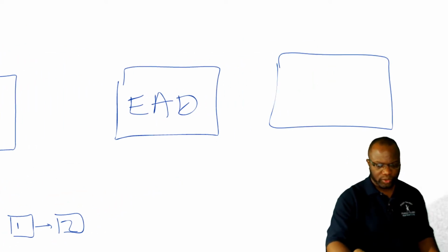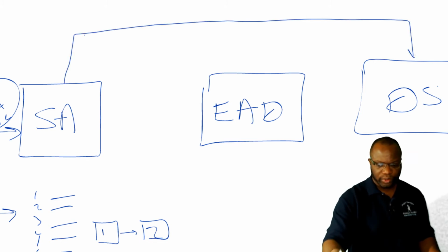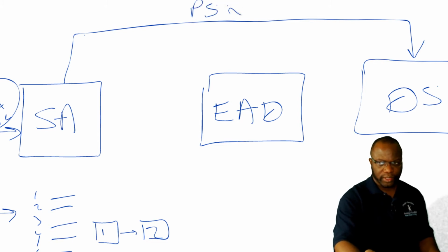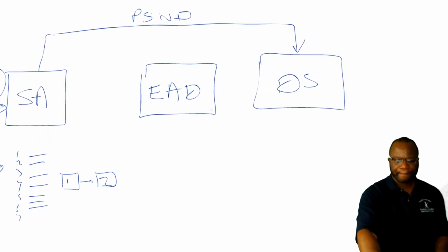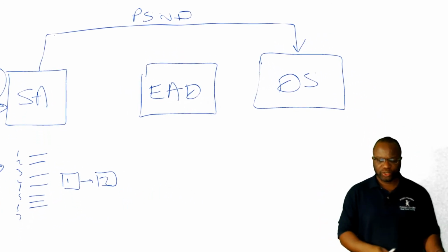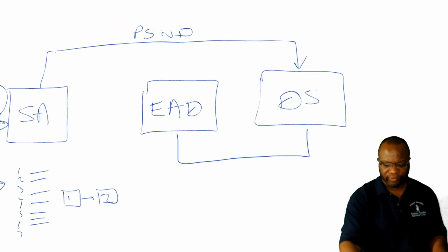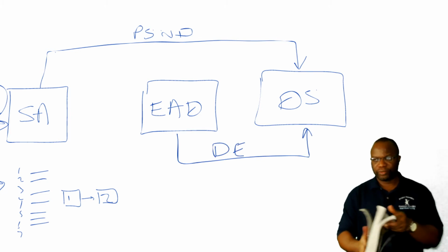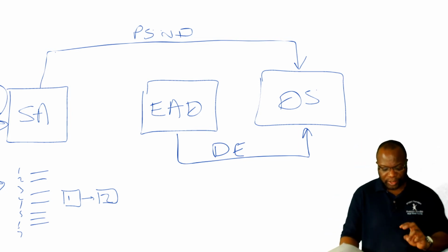to develop schedule, we should consider the project schedule network diagrams that we are creating here. So we've got this loop. We've got project schedule network diagrams. All right, let's make it smaller so you can see it. You see that loop over there? The project schedule network diagrams are going into develop schedule, but so are the durations that we get from here. So we have the duration estimates, the DEs, that goes into develop schedule. All right, so just take a look at develop schedule and you can see the duration estimates are going in.